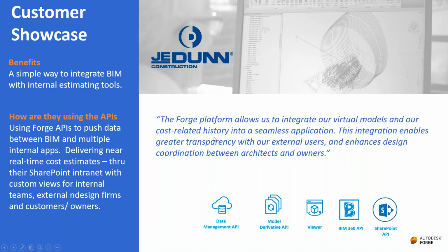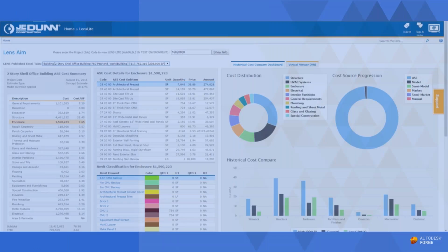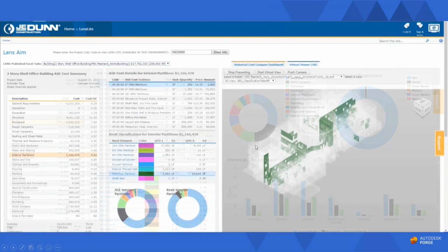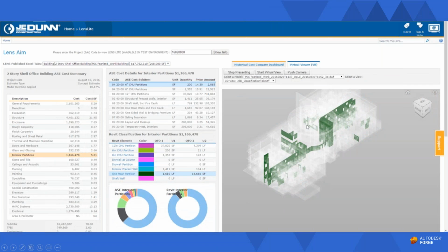And so this is really what GE Dunn came up with. They wanted to do a what if scenario. So essentially it means that they've got the design and they're going to go like, right, what if we do the double glazing and replace it by triple glazing? What if the wood is going to be replaced by aluminum windows, etc.? But obviously not just for windows, for just about anything. So they're using that viewer and they're hooking it up to their cost system and they're just doing what if analysis. So this is then being reviewed, and in the end, you get alternatives that are really ready to replace if and when it is needed, actually.